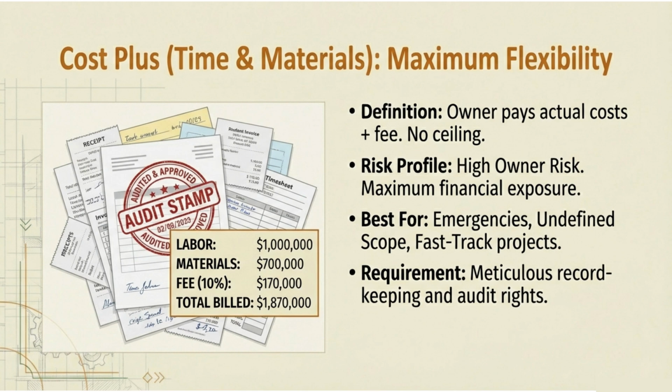Definition: owner pays actual costs plus a fee. No ceiling, no cap, just costs. Risk profile: high owner risk. Maximum financial exposure. You're basically handing over your credit card and hoping for the best.